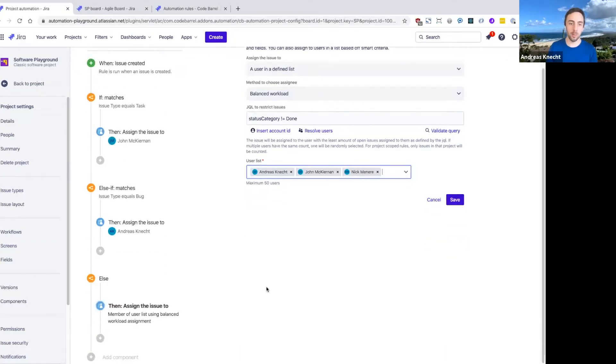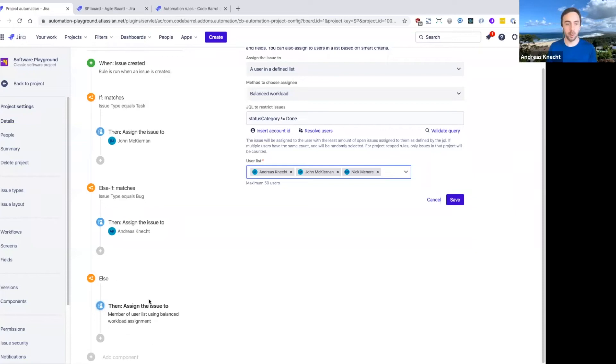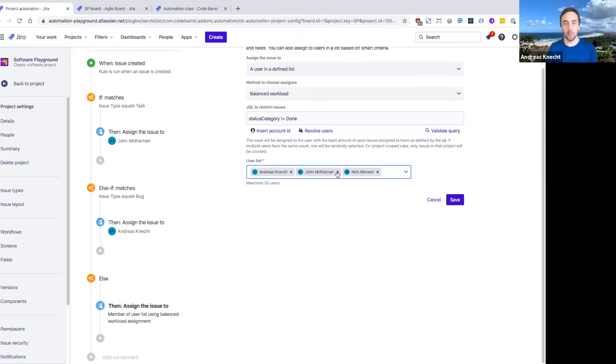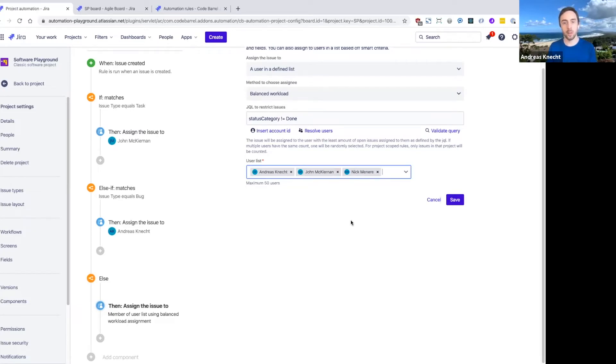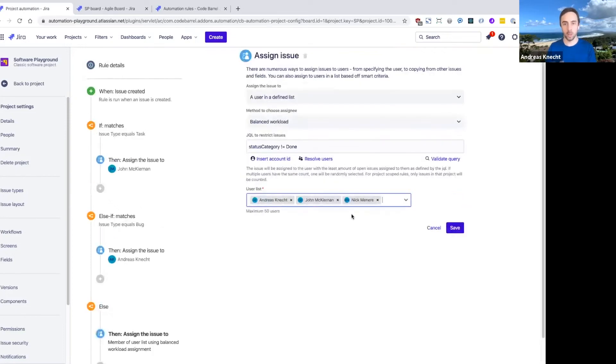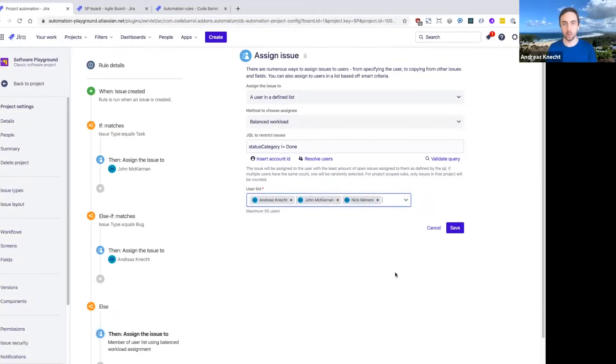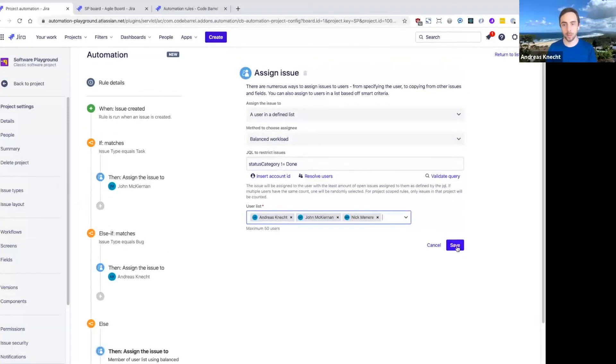With the balanced workload algorithm. What this basically means is that when an issue is created but falls into this block in this rule, automation will check how many issues do the three of us have assigned to us at the moment, and then basically pick the person with the least number of issues assigned to them currently and assign that issue to them so that we get a nice balanced workload across these three folks in our team.